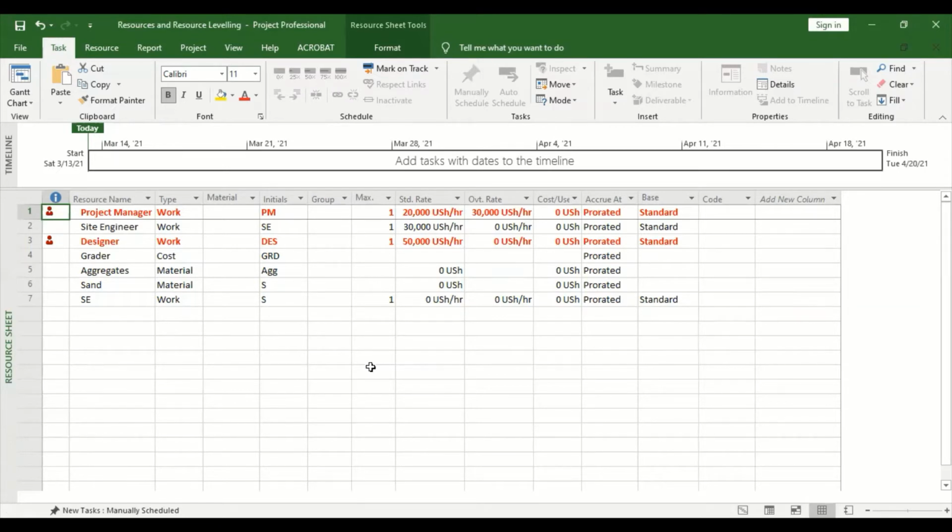If, for example, a project manager is assigned a particular task here, and is not going to be fully on that project for that task, it's just going to be part-time. You can decide to give a particular percentage, for example, 50%. Yeah, that's what it implies.